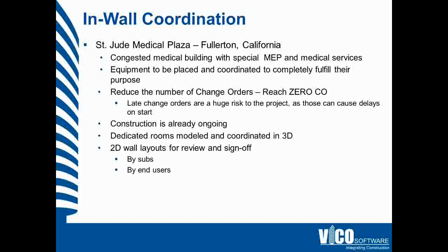We managed to reach zero change orders because at the end of the exercise, we involved the end users. We had sessions where the nurses and doctors could review not only the 2D layouts, the wall layouts that we created, but also the 3D models, so that they could better find out how their final work environment will look. And they did request changes.